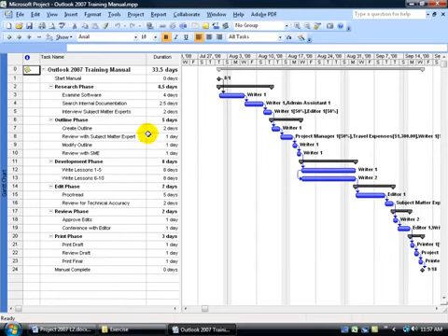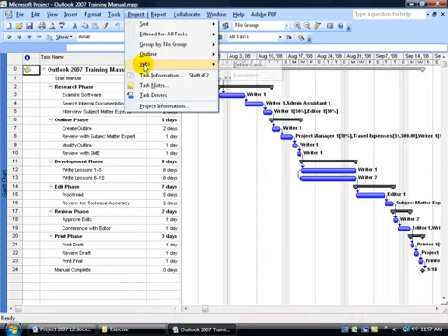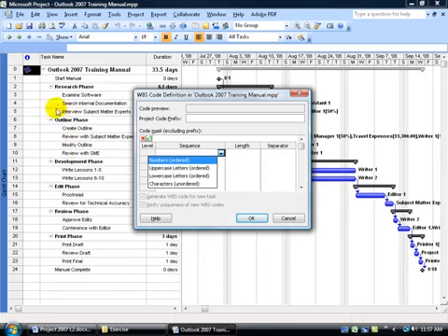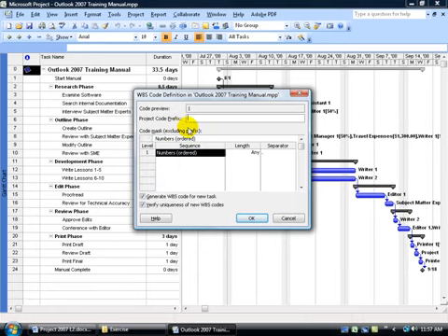Double click on that. And then to define the WBS codes for this project, come up here, click on the Project menu, go down to WBS, and let's define the code. Now there are several ways you can define the code. You can click on the drop down arrow and say you want the typical number order as you saw in the default outline, 1.1, 1.2, and so on. You can use letters, lowercase characters. I'm going to use numbers, okay? And then do I want a project code prefix?